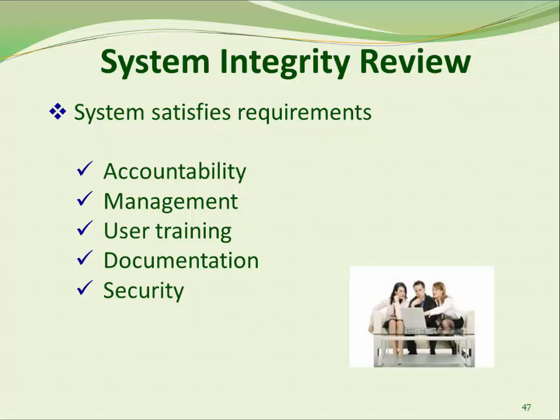In addition, you will be checking that the system satisfied requirements in these areas: accountability, management, user training, documentation, and security. Used at post-implementation, it is a critical look at whether the training was effective and the workers are functioning well, and if the contractor has fixed any outstanding issues. All aspects of the system must be validated and/or resolved before the warranty period expires.